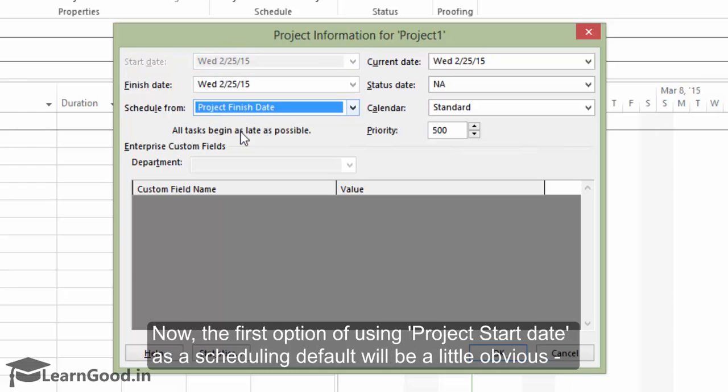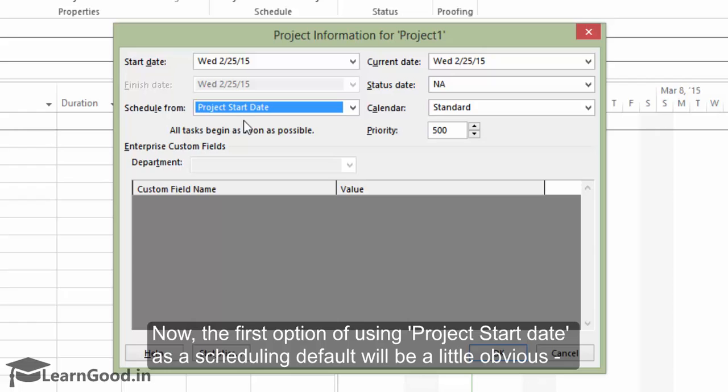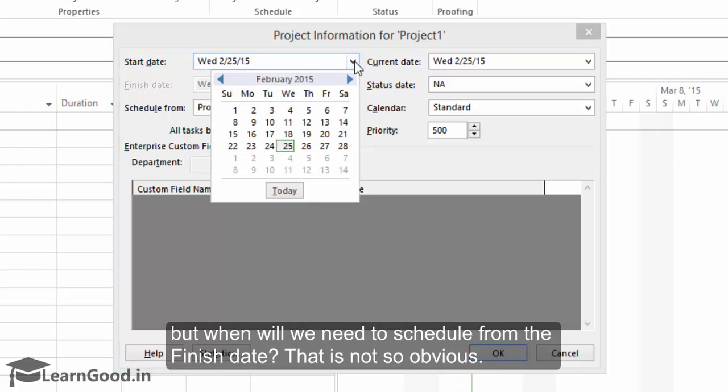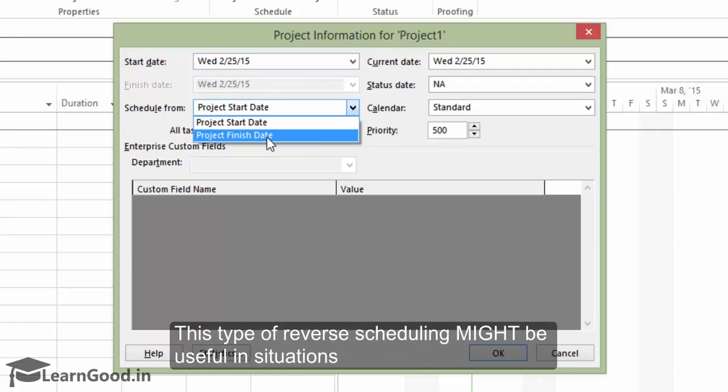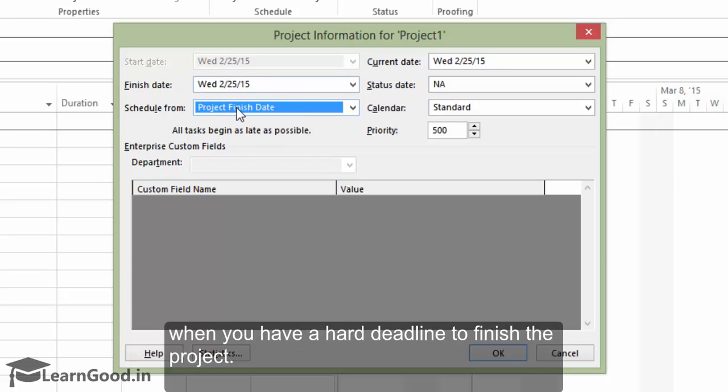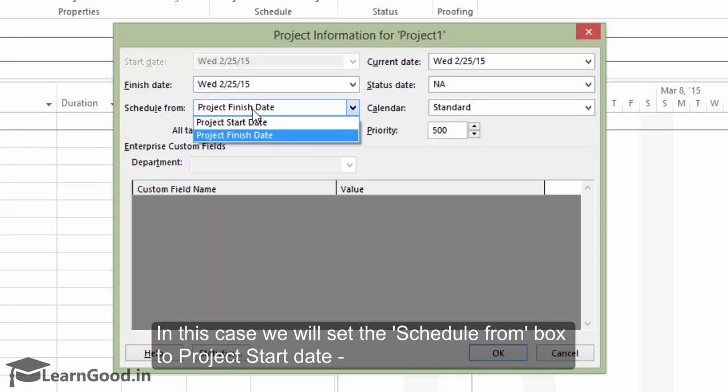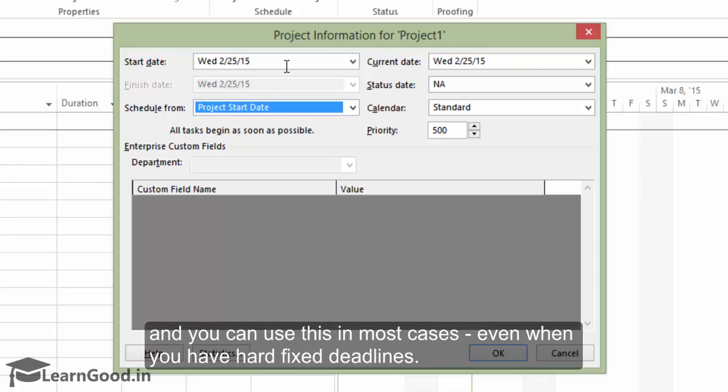This type of reverse scheduling might be useful in situations when you have a hard deadline to finish the project. In this case, we will set the schedule from box to project start date and you can use this in most cases even when you have hard fixed deadlines.